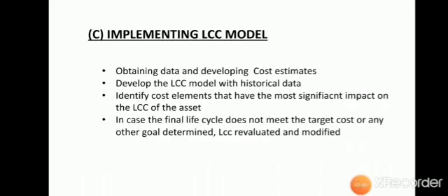The third step in LCC analysis planning is implementing the LCC model. It has to follow the following steps. First one, obtaining data and developing cost estimates. Second one, develop the LCC model with historical data. Third one, identify cost elements that have the most significant impact on the LCC of the asset.